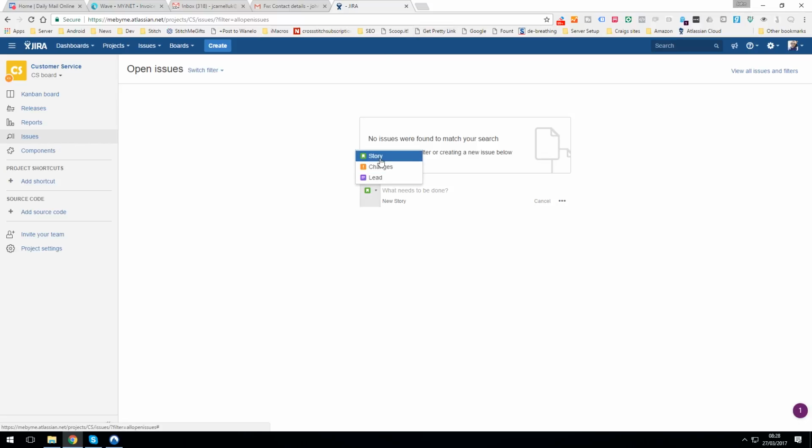Well, we've got story. A story is how we kind of hold a group of tasks in some respects. Now, it might be an individual task, but it might not be, because underneath a story we can also attach a subtask as well. So for instance, we might have a task that is related to creating a new brand on Facebook. So part of that task might be going and creating the actual Facebook page. Another one might be adding in the necessary descriptions and images. And another one might be then managing those initial comments that come back in.